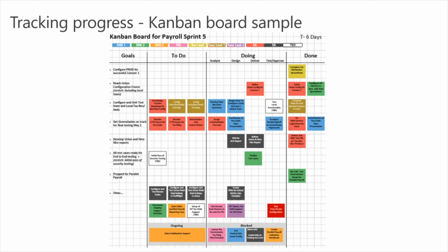They've been doing these 4 things for a long time. They're not making good progress. They're not able to work on 4 things simultaneously. I'm going to take away 3 of those and put them in the to-do. I'm going to say, finish this one. Then I'll give you the next one, and the next one. I'll feed you it in sequence so we can get the right level of progress, right?